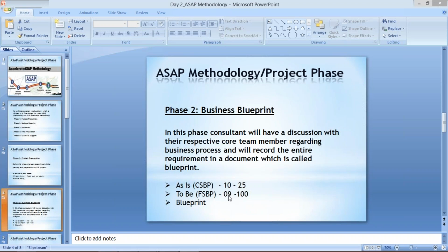So whatever these differences are, what will happen? There will be a discussion between the project manager from the Wipro side and the project manager from the client side, in the sense the Tata Motors side, about the differences. Like if one difference is there, they will discuss how important this last one is, which is not possible through standard configuration. If this is also very crucial, then our project manager is going to say that we have to do certain customization, certain development. Customization or development means we are going to change the standard shape, and then we can deliver those.